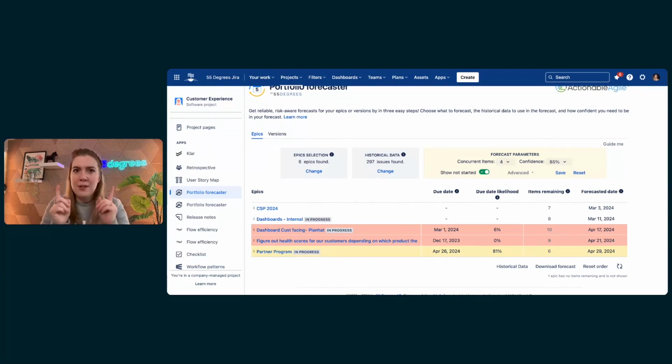Because remember, we're doing cascading Monte Carlo simulations. So now that I have set a WIP of 4, we take the top 4 ones. It's like you draw a line, and then you run the Monte Carlo simulations between those 4 ones. And when an epic is done, we pull the next one in the list. So that's how it works. So you can play with this one. Okay, so that's this scenario.